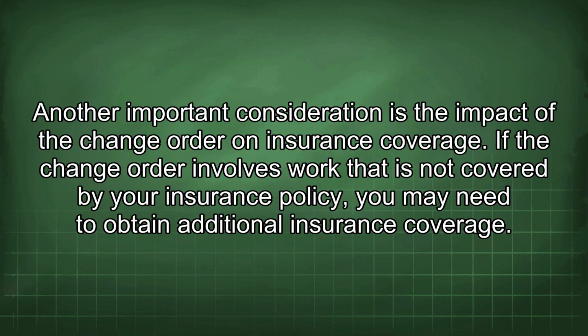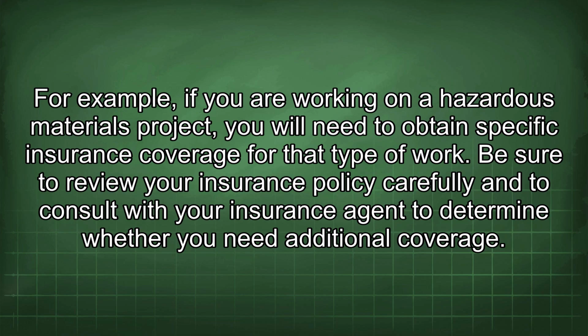Another important consideration is the impact of the change order on insurance coverage. If the change order involves work that is not covered by your insurance policy, you may need to obtain additional insurance coverage. For example, if you are working on a hazardous materials project, you will need to obtain specific insurance coverage for that type of work.